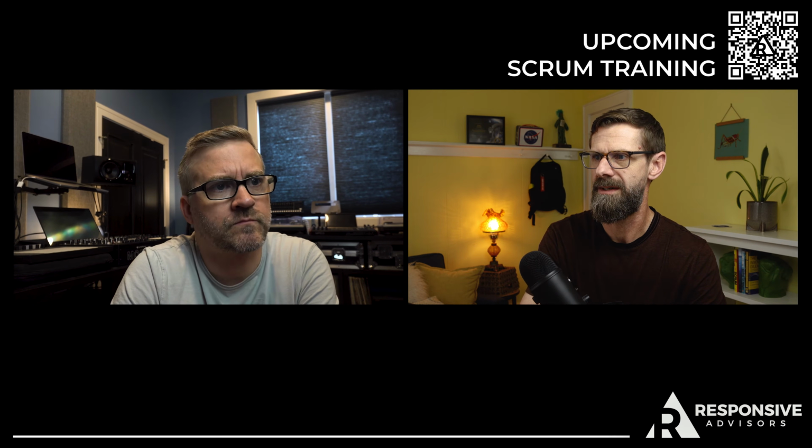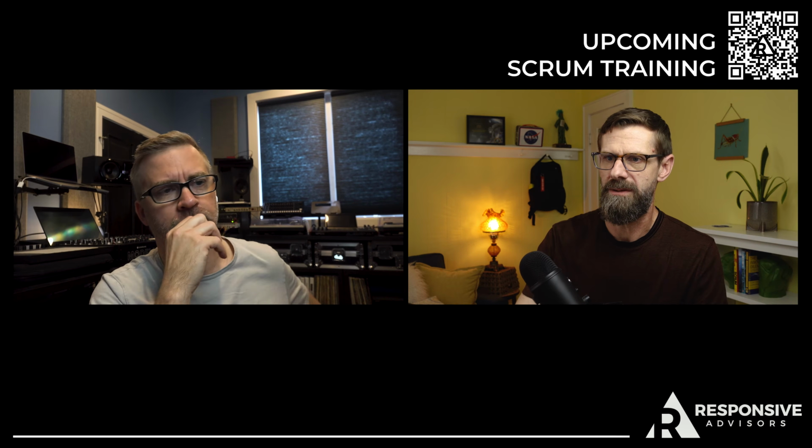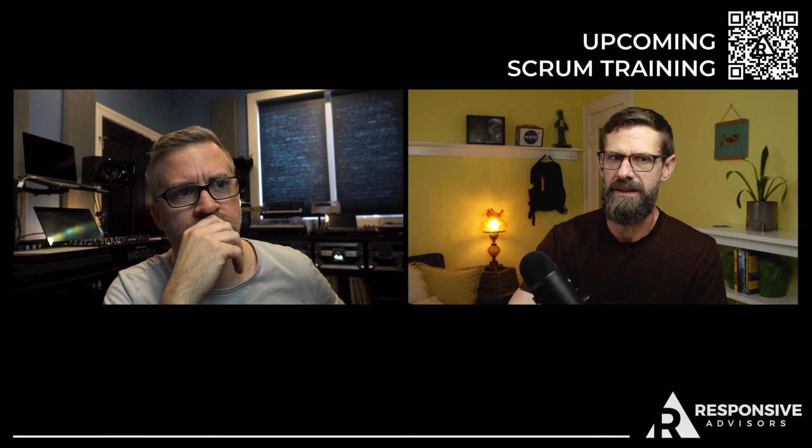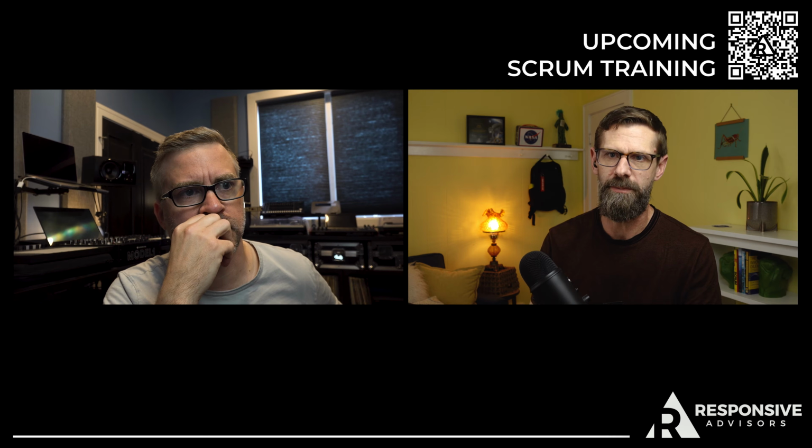Let's talk about the Sprint Backlog itself. What does the Scrum Guide say? It says that the Sprint Backlog should demonstrate real-time status of the work towards the Sprint Goal, or the work of the sprint. That's hard to do. Have you seen some of those tools? They're not super helpful. No. So we're going to advise probably bringing some additional tooling to the mix or some other visuals, whether it's a Kanban board that you're keeping updated, or some kind of a live stream, if you will, almost like what we call working out loud, that sometimes we'll participate in with, say, our Slack channels and whatnot. Keep the information flowing so that we always have a pulse for where things are at.